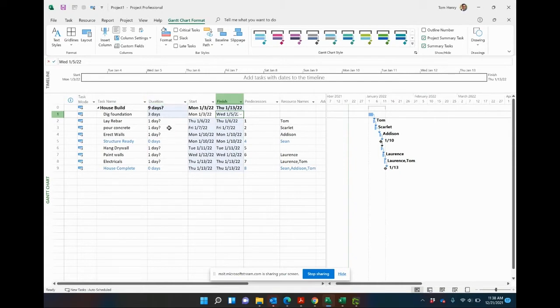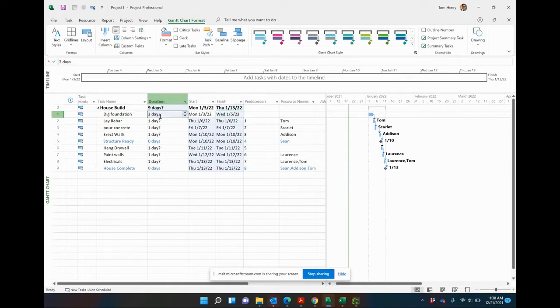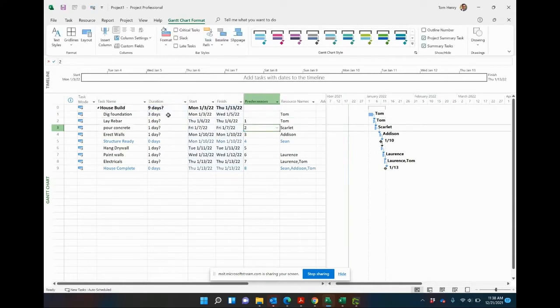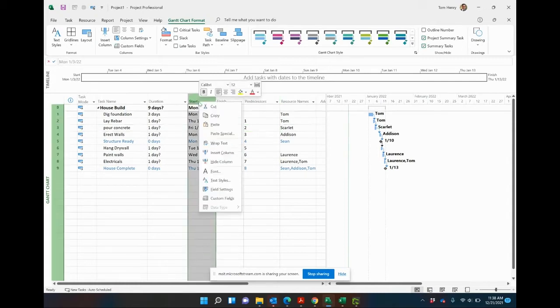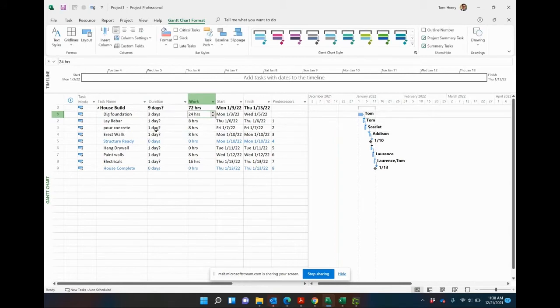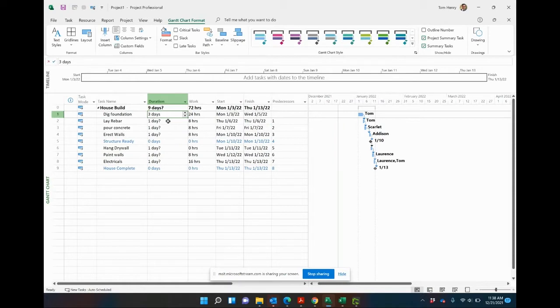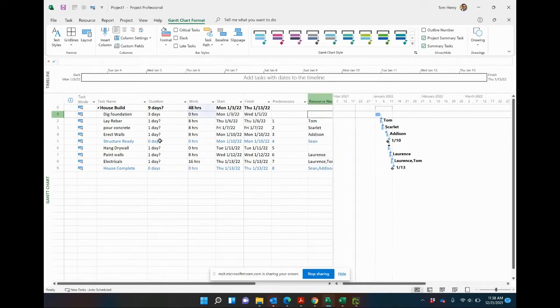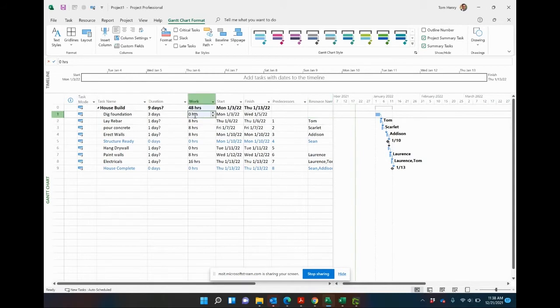What I want to do though is show you how to estimate the work. This task dig foundation goes on for three days, and if we assume that one person is working on it, let's say Tom is working on it, that work would be if he's working full-time, you're talking 21 hours for that. If I actually right click on start and put insert column, work, 24 hours is that what I said, maybe my math wasn't working. That's why we have Microsoft Project to help us. So you can see three days, 24 hours, that's with one resource. If I actually take that resource off of the task, you'll see the work goes down to zero hours.